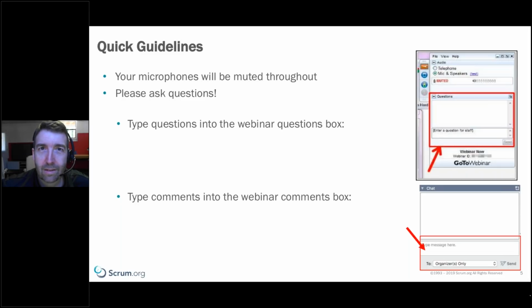There's lots of different methods, and it's hard in a webinar format to list them all. But the method I use is I try to understand requirements at a reasonable level. I don't want to say high or low, but you certainly don't want to be too detailed in your requirements, or else you're doing a bunch of big upfront design, which I alluded to earlier. But development team members need to be able to understand enough about what is expected of them to deliver, so that they can create some high, medium level estimates, and so that we can plan the work, so you can have an idea and you can tell other stakeholders when the work might be delivered.